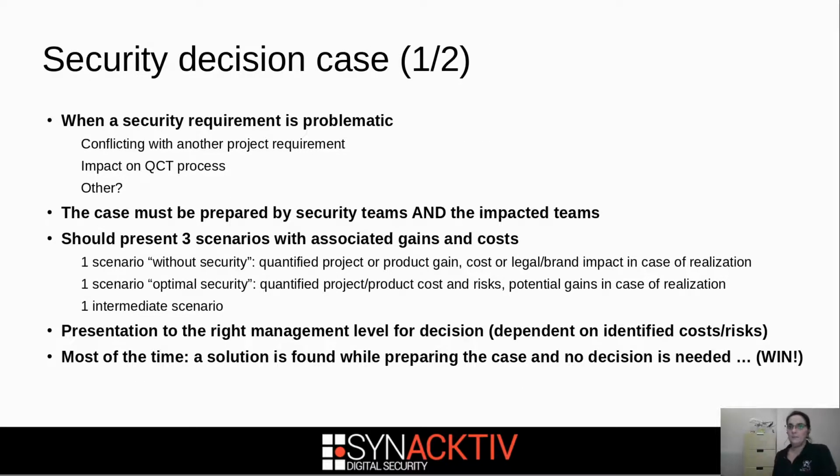So I've talked several times about what is a security decision case. So what is it? For me, it's when a security requirement is problematic for the project. Problematic because it either conflicts with another project requirement, so it could render a functionality useless, for example, or it has impact on either quality, cost, time of the project, or maybe something else, I don't know. Okay, so you're going to prepare a case, slides most of the time, to present to someone who is going to make the decision.